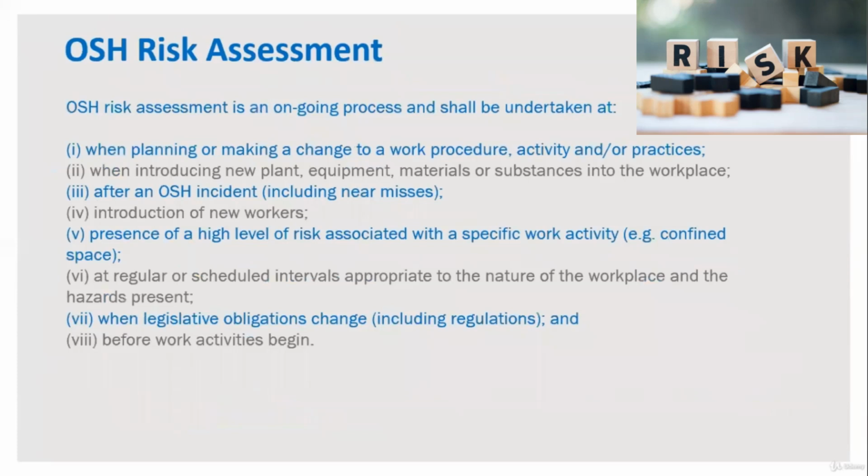OSH risk assessment is an ongoing process that shall be undertaken when planning or making a change at the workplace, or to a work procedure, activity, or practice. When introducing new plant, equipment, material, or substances into the workplace. After an OSH incident, including near misses. So whenever there is an incident, we need to do a risk assessment to avoid recurrence of similar incidents. Introduction of new workers.